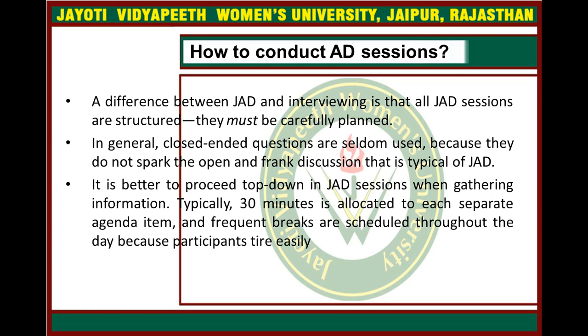Typically, 30 minutes is allocated to each separate agenda item, and frequent breaks are scheduled throughout the day because participants tire easily. So we have to keep this in mind while conducting JAD sessions.